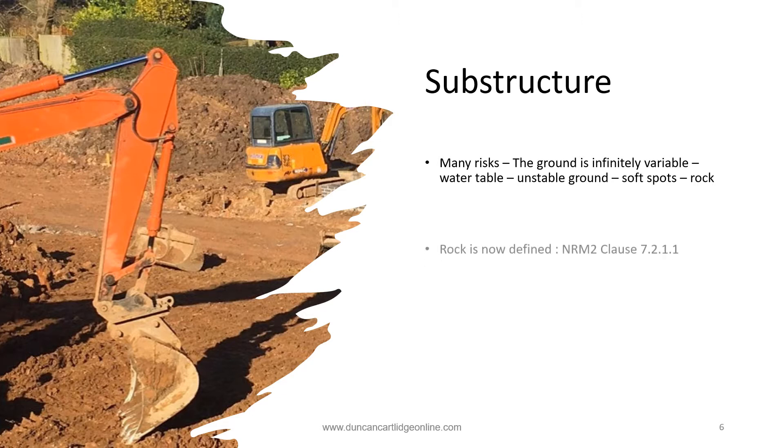NRM2 now contains a definition of rock as this has long been a bone of contention between contractors and clients. The definition is rock is any boulder greater than 5 cubic meters. Additionally any boulder that can be removed by an excavator bucket is not rock.